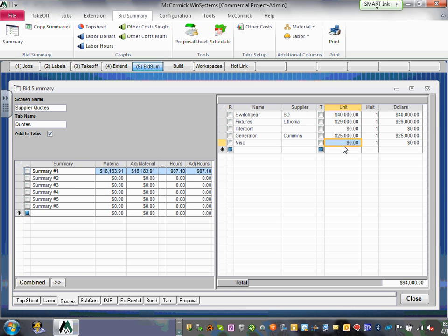Now, Derek, you must take off the generator then. When you're doing takeoff, Chad, you told me the price is here. That's just the price. What you take off is the installation. So later on, when you take off your generator, count it. We're going to go right next to the generator price and change it into quotation.